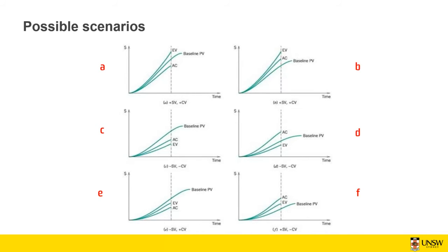Most of the time your earned value is close to planned value if you've done a very good job, but most of the time it is a lower value compared to the planned value. So C is a better scenario, in terms of your actual cost and earned value being close to each other, but D is the worst case scenario here because it shows us that the cost variance is too much.